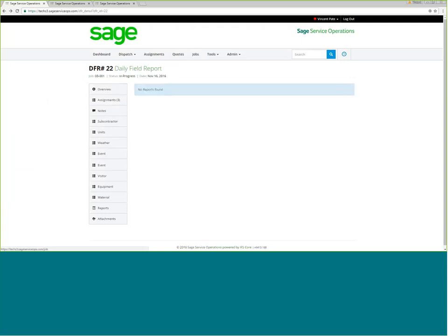Lastly, one other piece to this is we do have the ability to create custom reports as well. So think of your safety checklist that you want to do, or another thing that I've had people use on the daily field reports is create simple change order requests or potential change order requests or RFIs. They don't tie back into the rest of the system, but you can absolutely create a report that will automatically capture a potential change on the daily and email that over to somebody to take action on and create an actual change request in your accounting system. Or, hey, I have a quick question for you, and then that'll shoot that off. Safety reports, violations, things like that are also part of there.